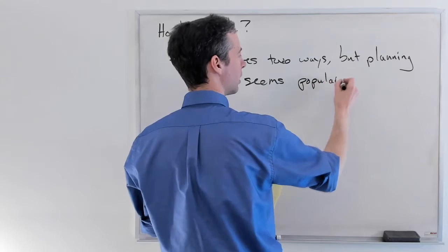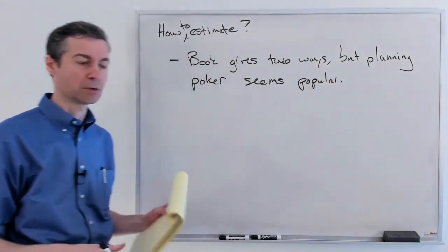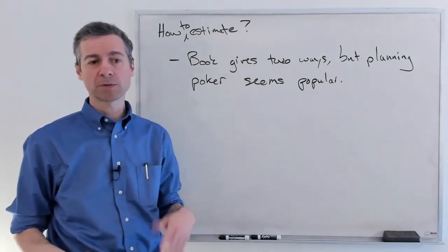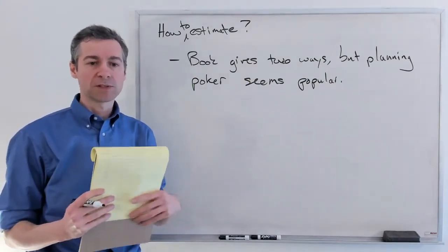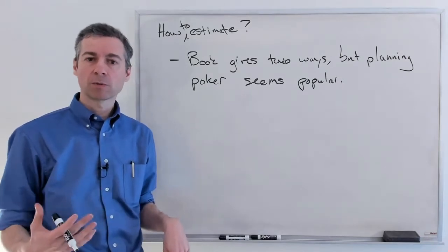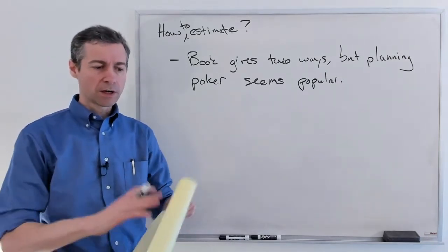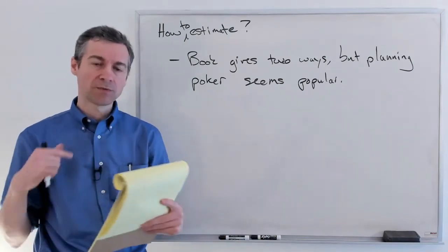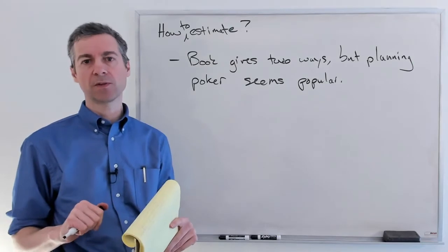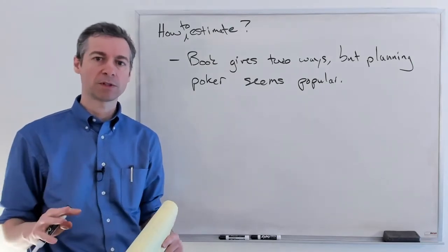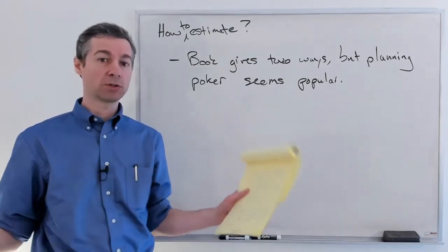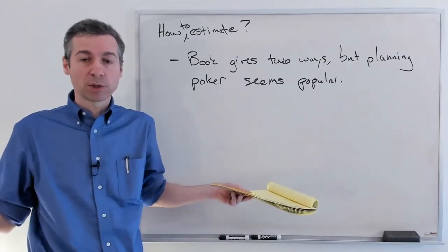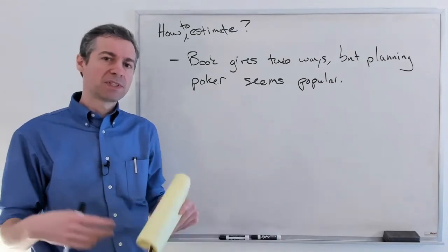And go ahead, I recommend you just skip the other and use it. It will work well online as well, remotely. There are a lot of great websites. We have one that we recommend. Basically, the way planning poker works is, all right, everyone, we're looking at this story. And then each person secretly puts in their vote of how many story points they think the story is. Once everyone has submitted their votes, the system tells you, did you all agree? Oh, if you all agreed, great. That's how many story points the story is. If you disagree,